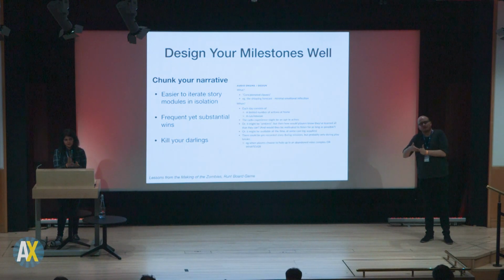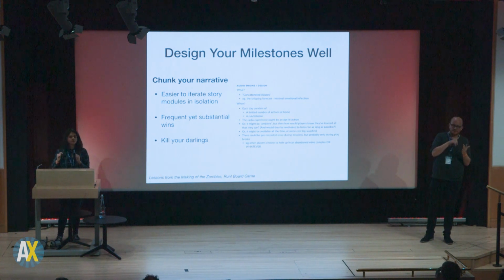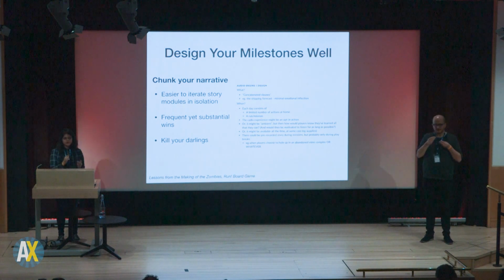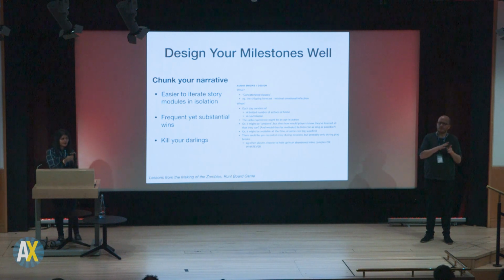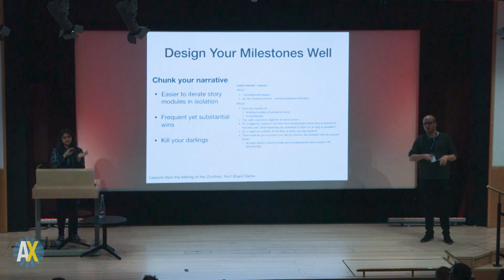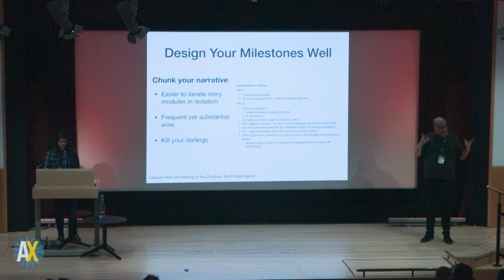And we did our playtesting as well in the form of focusing on one main script and a couple of these side scripts, depending on where we needed. This allowed us to easily iterate these story modules without having to worry about what effect it would have in the future. Because as soon as we had a draft of something going, we would just playtest it within ourselves first, go back and edit it a little bit, then have an external playtest where other people tried it and hopefully didn't poop all over it. But it helped us go back and refer to things and change things quickly rather than write an entire thing and break our hearts because, you know, we had to scrap the whole thing.